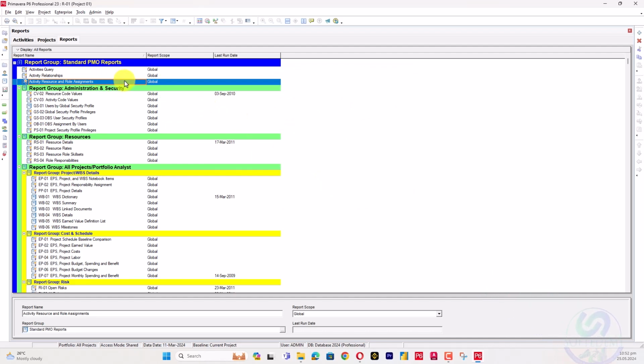So from this one we will get our data for our previous schedule and our updated schedule. For the previous schedule I have used the name baseline schedule. Sometimes some people compare a baseline with an updated schedule or a revised recovery schedule. So it's different globally; in different countries it's different. Like in the US, some people use an updated schedule for comparison, or last month's comparison. So it depends on which schedule you want to compare.